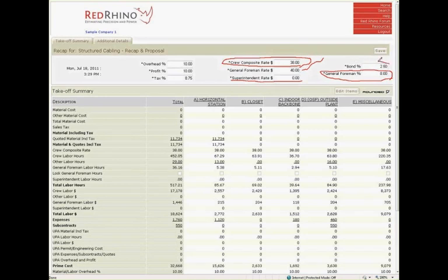If you're required to pay for bonding on the project, you can input the percent at the right here. I set it up for 2.5%. Next, I'm going to click the Save button to save my work. Again, this is where you make changes in the header.